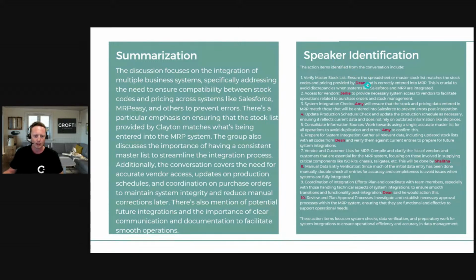You'll see here we can pick up who's in the meeting, who said what, who's going to action what item. And so this can be automatically picked up, and this is what's super crucial. The ones I've highlighted here, essentially this is a conversation, and this is an action that needs to happen, but no one said who's owning that. So you just need to be careful when you're going down this world. You need to actually stipulate who's got to do that action item, and what are the next steps on that particular item, right?